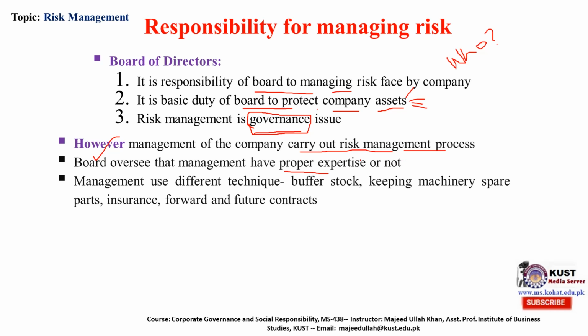What proper expertise is needed by the management? Is there any person who has a degree in risk management, or has obtained any risk management training, or any person who worked in an insurance company to assess the risk or not? So management uses different techniques, for example, in order to avoid the shortage of raw material, they maintain a buffer stock.